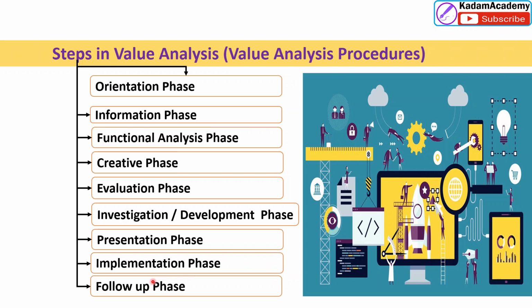So what I have said, the follow-up phase is very important, friends. Here, the follow-up phase will audit what is going on with your implemented project and the savings, and compare the results with the original expectation. Already you have planned what to do and decided what the results should be. According to that, are you achieving or not? Whether there are deviations, you have to find out. Whether the original expectations are achieved or not, that way you audit it.